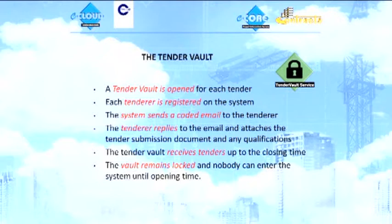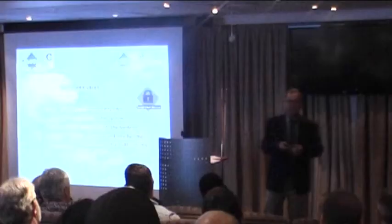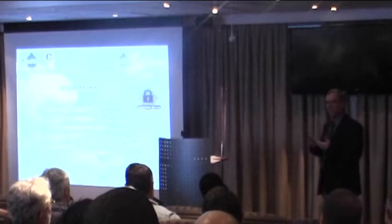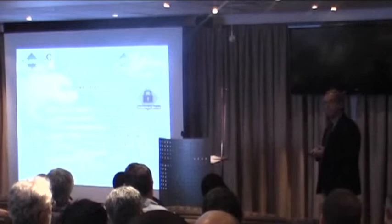The tender vault is open for each tender. A series of tenderers are logged on against that particular tender. The system sends out a coded email to each of the tenderers. They merely reply to that email, attach their tender, and any qualifications that they have to the tender. The vault remains closed and cannot be interfered with by anybody until the opening date of the vault. So if you submit your tender, one of the problems with email at the moment is if you're doing an electronic tender and you send it one minute early, you never really know whether someone has got your number and just passed it on to his mate and his mate comes in with a tender 30 seconds later, a few rand below yours. That can't happen. The tender vault stays closed and on a given time it opens and then you can retrieve the information out of the tender.